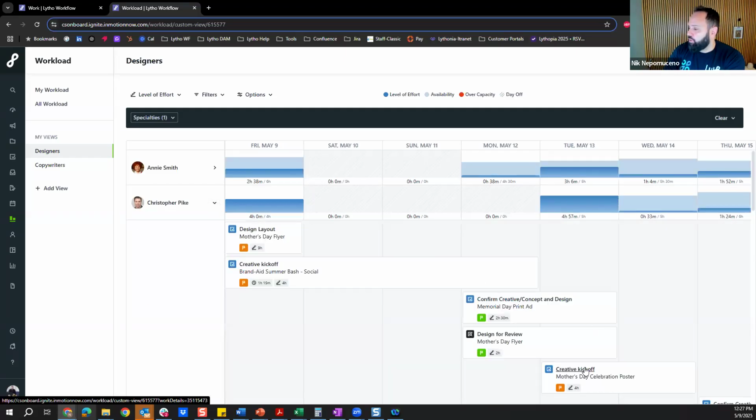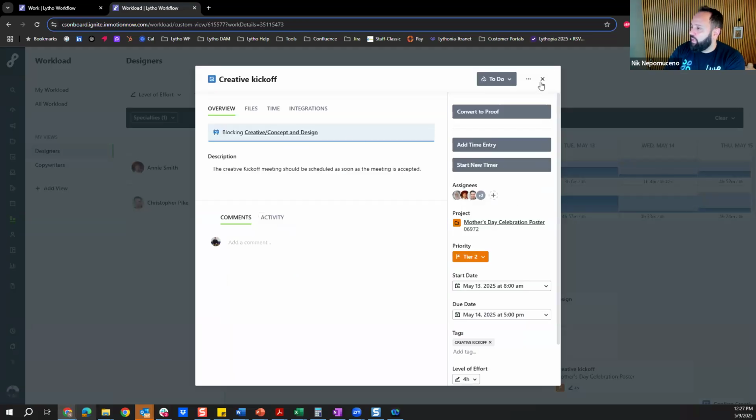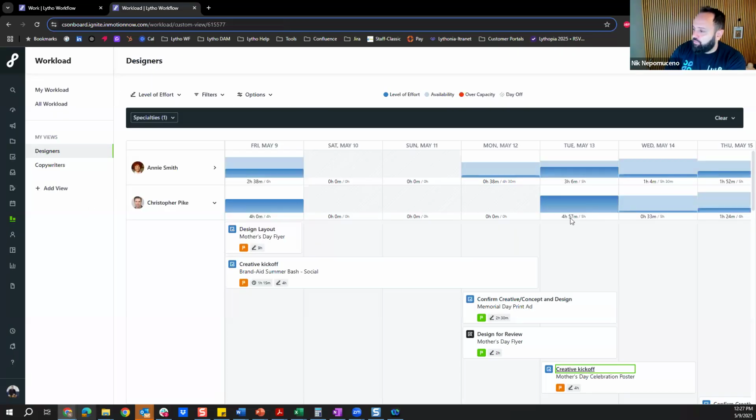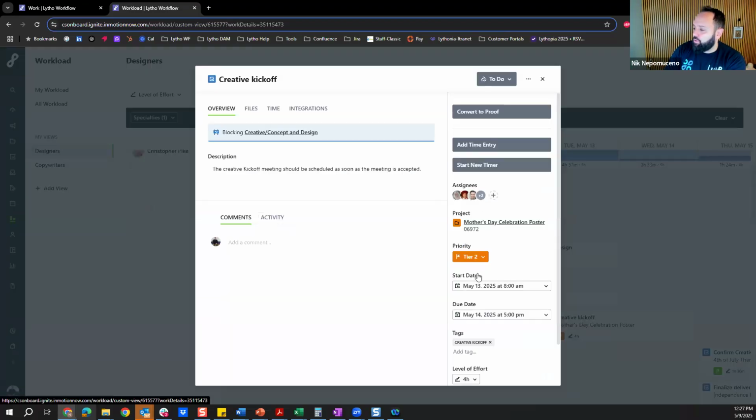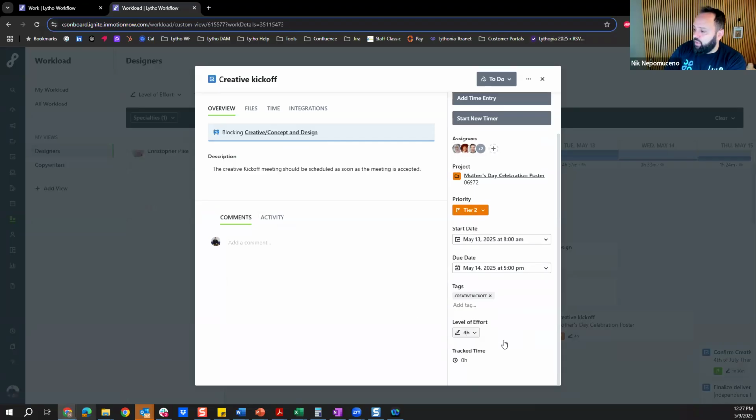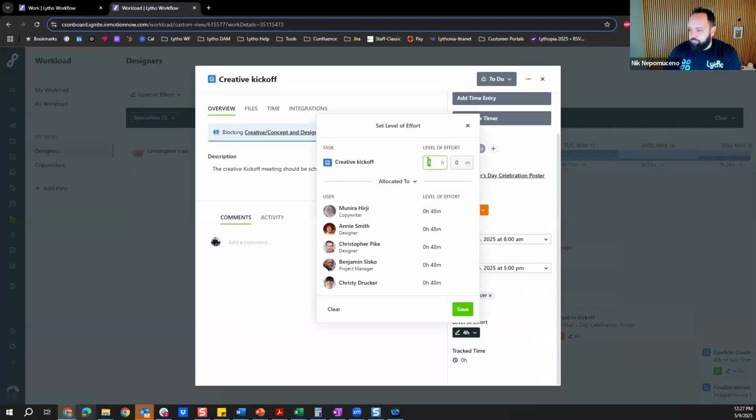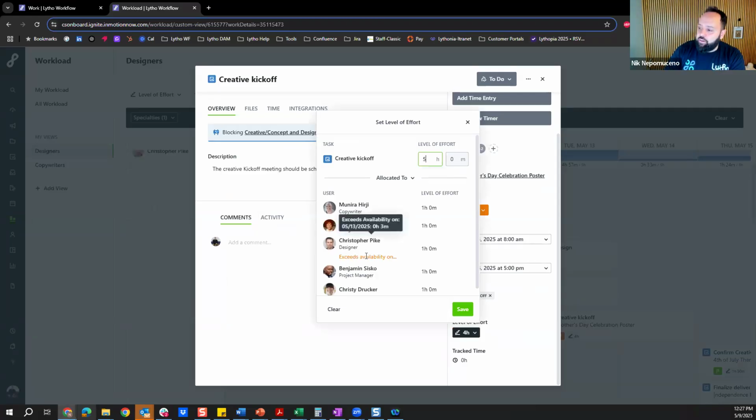So let's say I'm in this creative kickoff, and we saw here that Christopher only has 3 minutes left on Tuesday because he has 5 hours and he has 4 hours and 57 minutes. So if I were to come to this creative task and change the level of effort, let's put 5 hours now. You will see here that now Christopher exceeds availability. So it's telling me, hey, if you're going to increase the level of effort here, he's going to be over his capacity. So maybe you either reassign or you change that to somebody else.